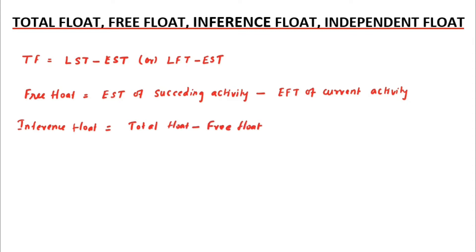Next is independent float. The independent float is the amount of time an activity can be delayed without delaying the project completion, where the starting of the succeeding activity is not delayed by the preceding activity. The formula for independent float is: EST of succeeding activity minus LFT of preceding activity minus current activity duration.